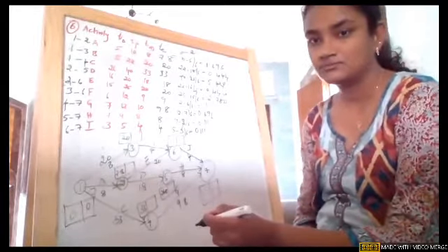Okay, fine. So now on node 5 it is 25.8. On node 7 we will see. Come back to node 6. So two arrowheads. One arrowhead is giving a duration of 7.8 plus 20, which is 27.8. The other one is giving 29. So obviously the maximum duration is 29, so I'm writing the same.